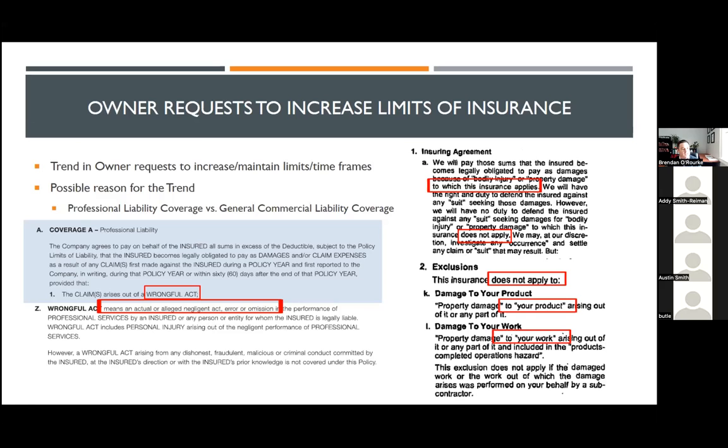So in essence, the insurance companies for the GCs do not provide coverage for faulty workmanship, for errors in reviewing plans, or for constructing in accordance with contract documents. Their insurance company is not a guarantor of them doing a good job.